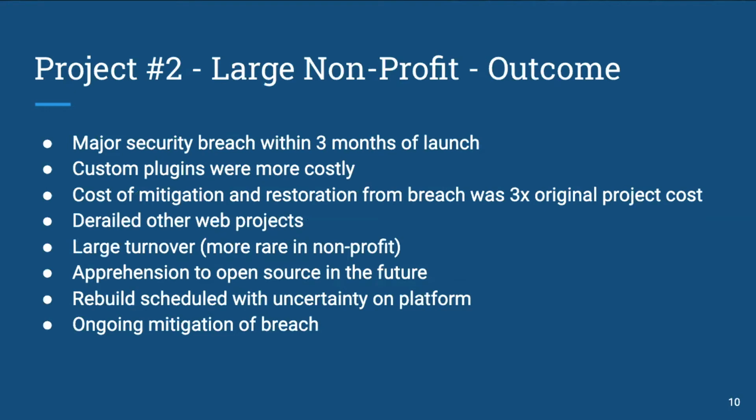And in addition to that, all of the custom plugins that they were making were more costly in all likelihood than if they had just either gone with the full stack model or Drupal or something similar. The cost of mitigation and restoration in total ended up being well over 3 times the original cost of the project. So understanding here that the selection of open source tool that you use is a real critical cornerstone that is going to be a major decision that will ultimately determine how successful your web project will be. Because if you are trying to cram a huge amount of stuff into a tool that wasn't built for all of that, you will struggle.